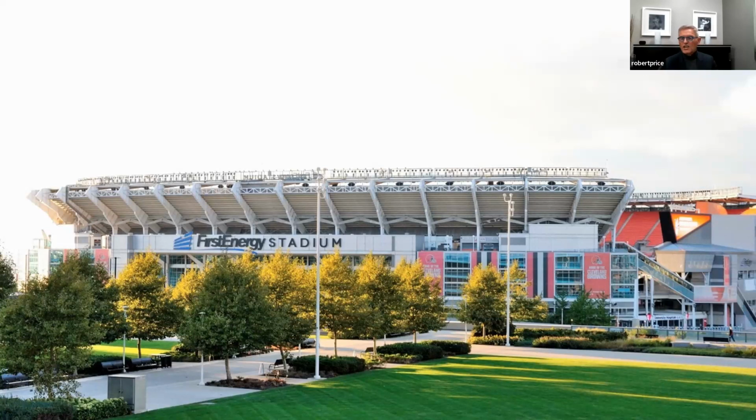Really, there were 4 objectives on this project. Number one was they were way over budget and looking to cut $500,000 out of the F&E budget alone on the project. So cut the budget by $500,000. Number 2, do so without compromising the design integrity. The design concept for this renovation had actually been approved 2 years prior. It was the 3rd of 3 phases that they were going through, and so they didn't want to change the design or try to keep the design as close as possible.